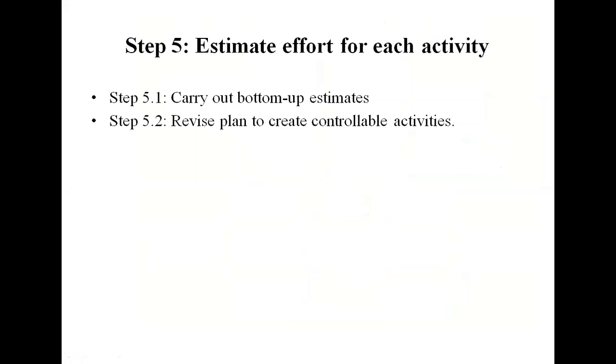What is carry out bottom up estimates? So here in this point, distinguish carefully between effort and elapsed time. So what do the estimates mean? Carry out bottom up estimates include staff, time, effort. Effort is nothing but staff multiplied with time. Staff into time, we call it effort. And other resources are also needed. So we have to carry out bottom up estimates for this, whether efficient staff is included or not.